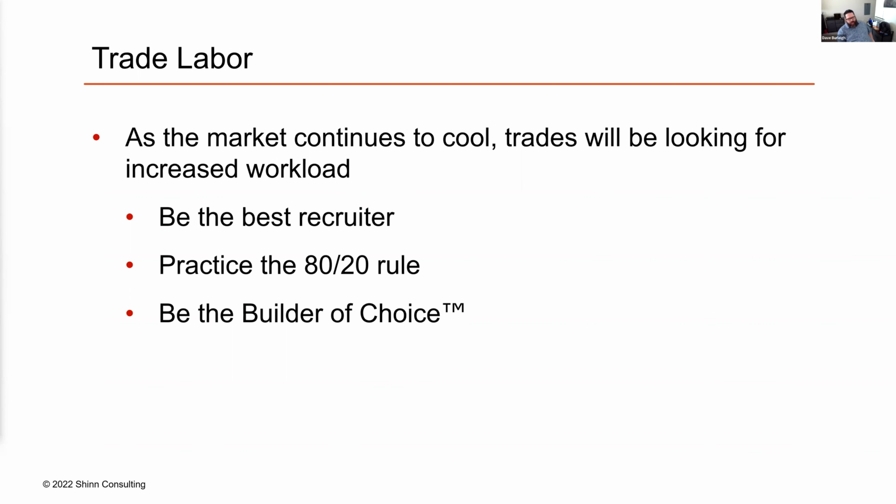So the other thing to keep in mind is as we get rid of bid management and switch over to unitized pricing, the ability to bring on new trades is much faster. Because I'm not going to go find a couple of electricians and have to give them a bunch of my plans for them to get bids for me.